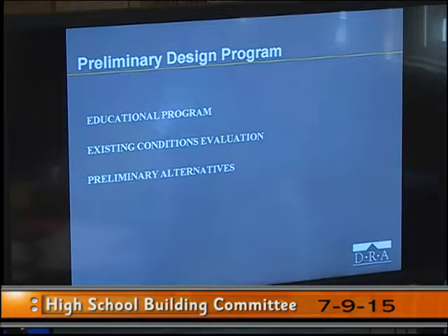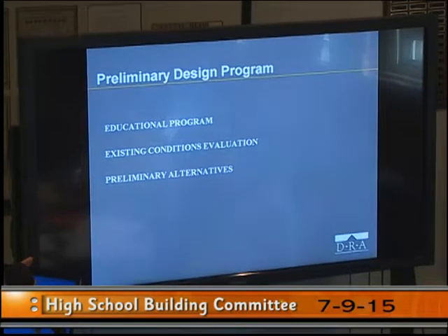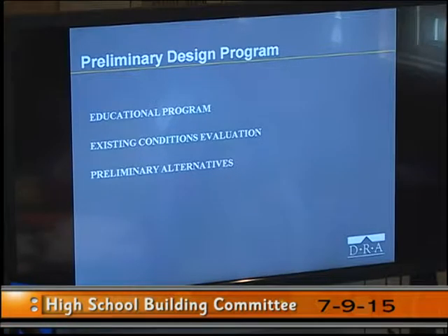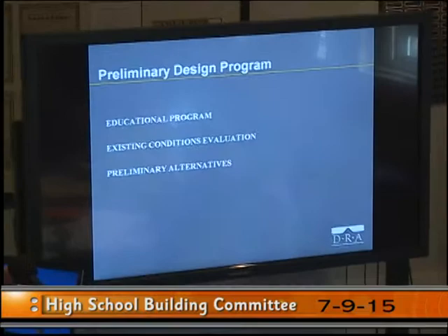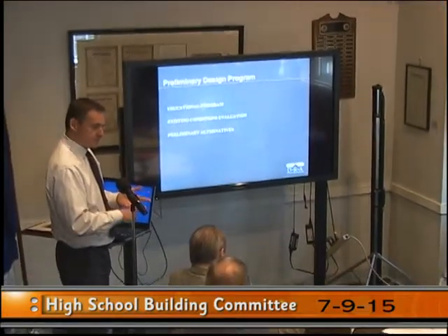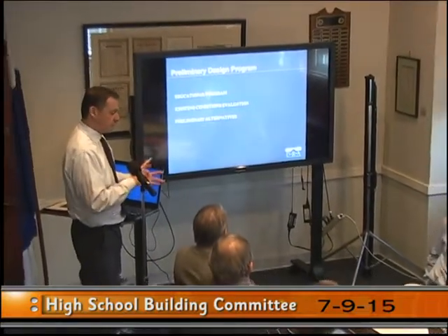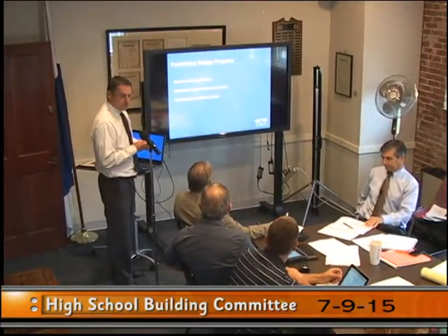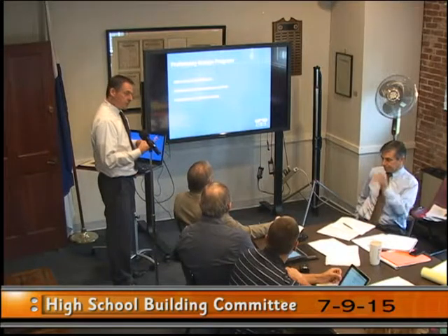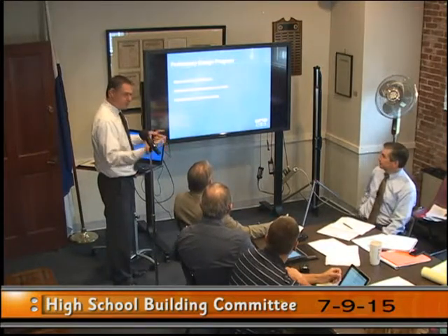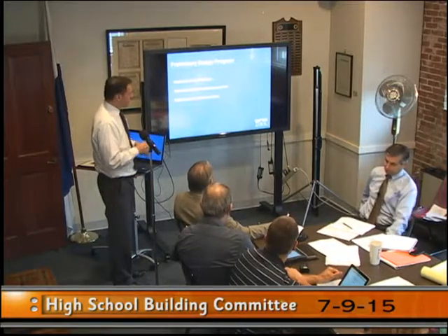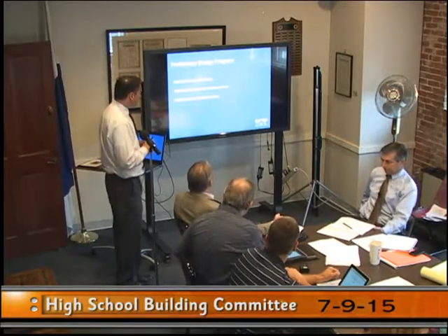And we've started on that effort. This week, all of DRA's consultants have been out to the site. I believe that the technology consultants came out today. They met with some people from the technology department for the district, but all of our disciplines, HVAC, electrical, plumbing, fire protection, civil engineering, landscape architect, they've all reviewed the existing conditions. They'll be putting together reports for each one of those disciplines. DRA will be putting together an architectural report of the whole facility, and that'll be a big part of the effort going into the PDP.